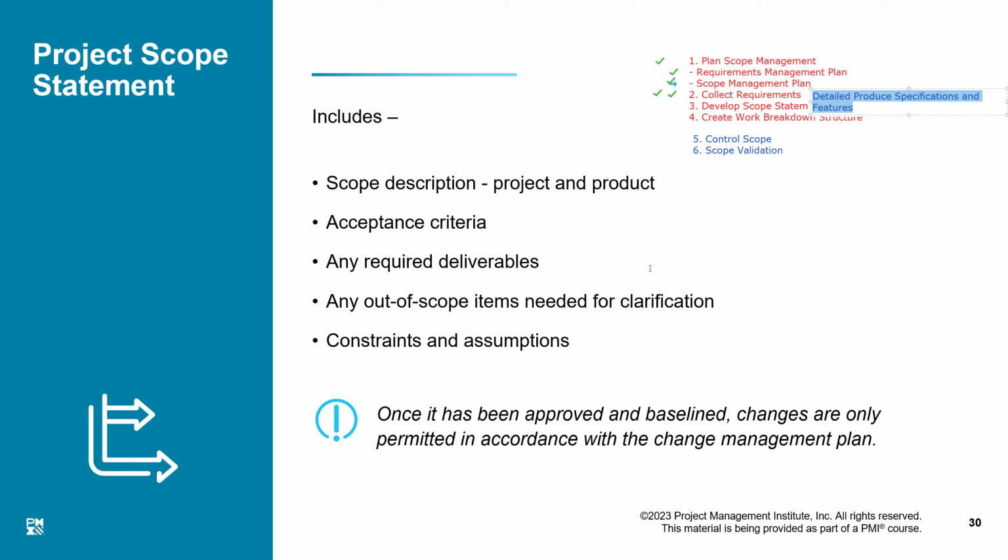How did the product scope come into being? That was after prioritization of requirements and discussion with the customer that, okay, we agree that these elements must be included as a product. In the product scope, maybe all the requirements are not entertained, only the shortlisted or agreed requirements are added. That forms the product scope.